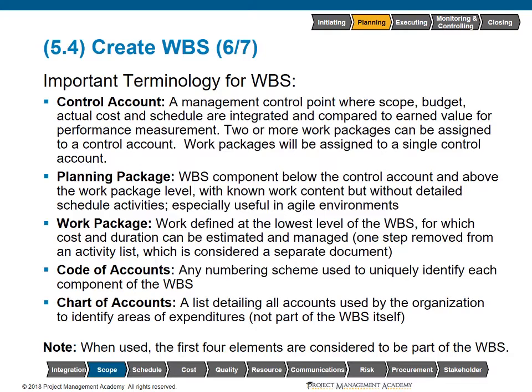And we have our chart of accounts. So the chart of accounts is how we're going to track the money. For those of you that have any experience with accounting software, within one bank account, we can go ahead and have basically sub-accounts that exist only within our software. So we can look at and say we've spent so much on this and so much on that. Meanwhile, we've allocated so much for this, so we're over budget in this area, under budget in that area.